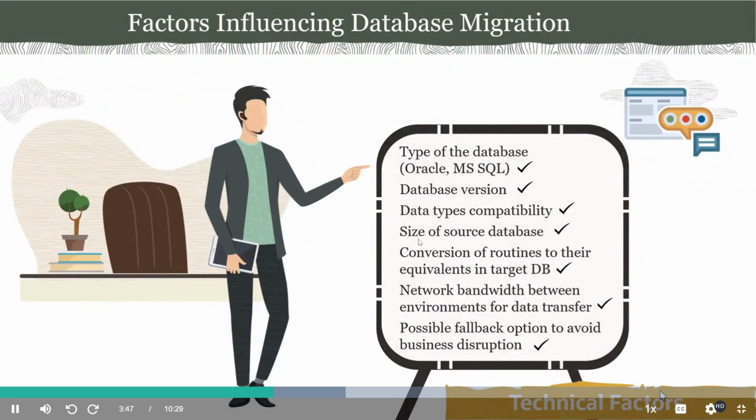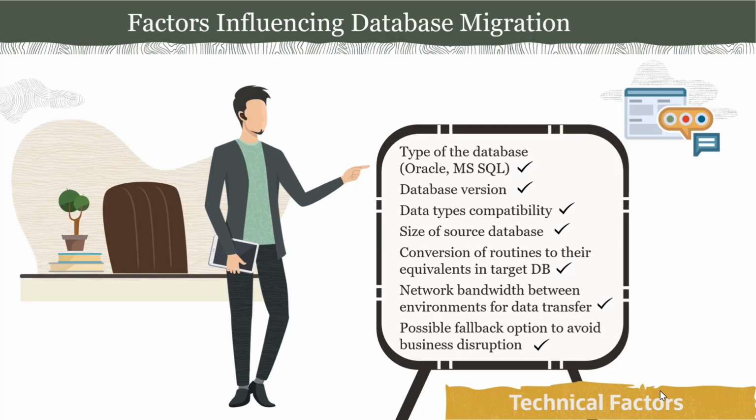Let's now discuss the technical considerations to be taken into account when planning a migration. We look into the source and target database type. Are both of them the same or heterogeneous, like Oracle type or non-Oracle type? Based on that, we need to assess the feasibility, the best method to use for migration, the amount of effort and the skills needed, and an estimation of the duration of the entire migration task.